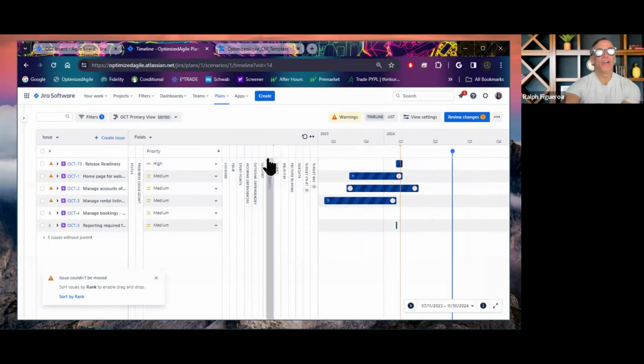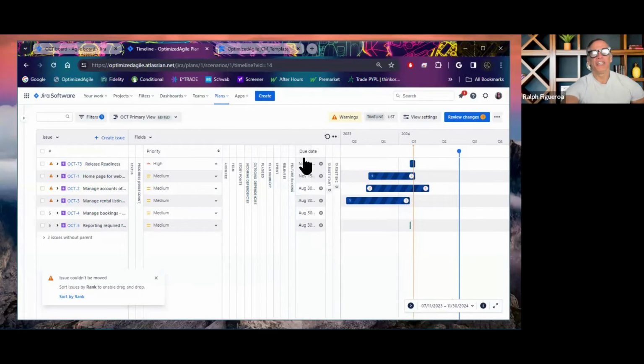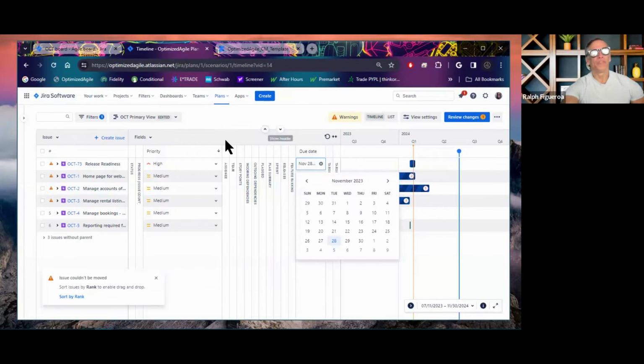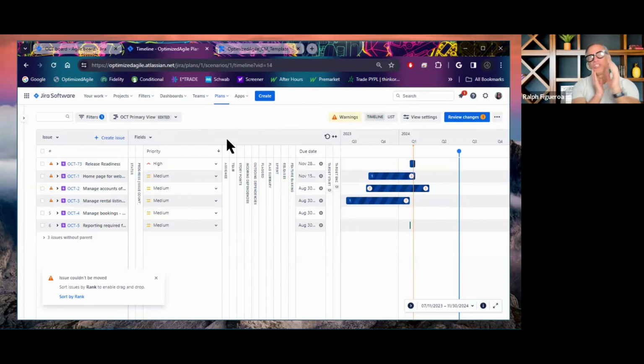It depends. In my case, in my fake project, I'm the product owner, I'm the VP, I'm everything here in this project. A lot of these flags appear because I am leveraging this field called the due date, which is a field in Jira. It's a date field. If I am the product manager, I use the due date field to articulate to my engineering team that we have a feature complete milestone where all the features need to be done, right?